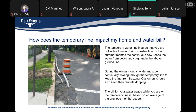The transfer typically takes about 30 minutes per house or business. How does the temporary water line impact my water bill? The purpose of the temporary water line is to ensure that residents and businesses stay in water service during construction. In the summer months, the continuous flow will keep the water from becoming stagnant in the above-ground temporary line. During the winter months, we will ask residents to keep their faucets dripping a little bit so that the temporary line keeps having flow to prevent it from freezing. The bill for water usage while on the temporary line is based on the average of the previous months' usage.